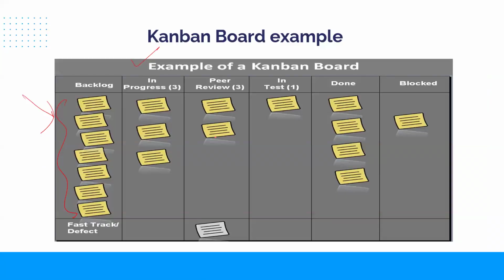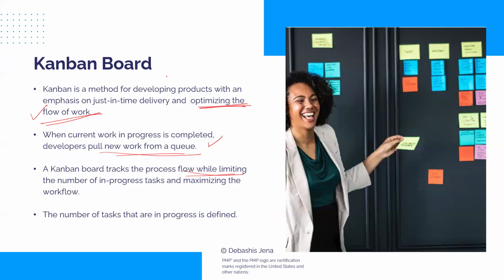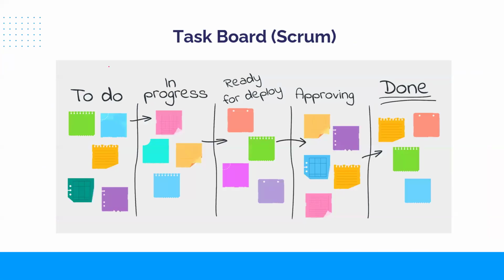How do we identify the limits? The limit has to do with your team size. There are 5 people, so they have a certain capacity in this stage. If you want to change the limit, you can change that. If you find our limit is less, you get more people, so that our limit will go up. So the limit, I repeat, has to do with the number of people or team you have for that work. So the limiting system is specific to Kanban boards. That limiting concept doesn't apply in a Scrum board. There's no concept of limiting here. True.